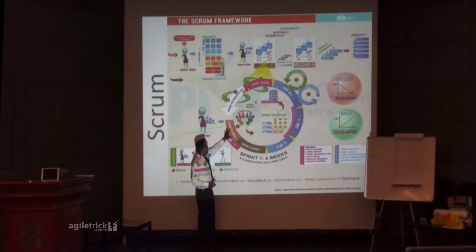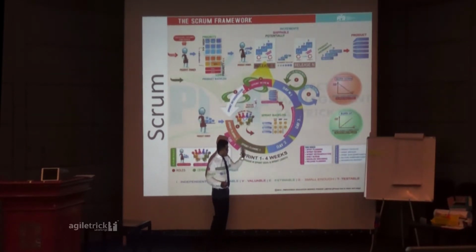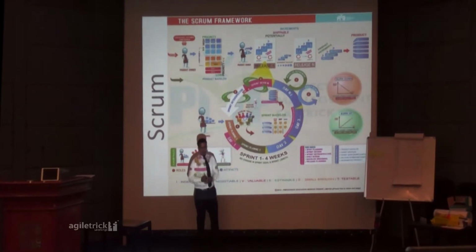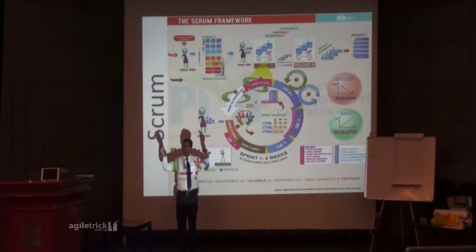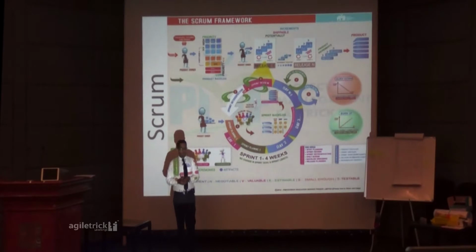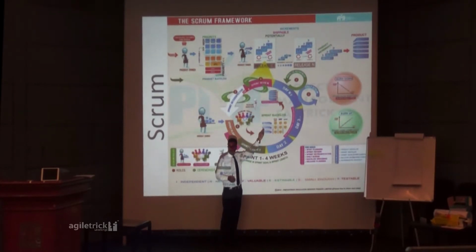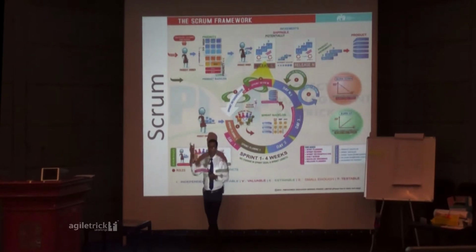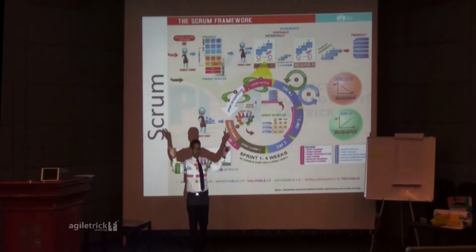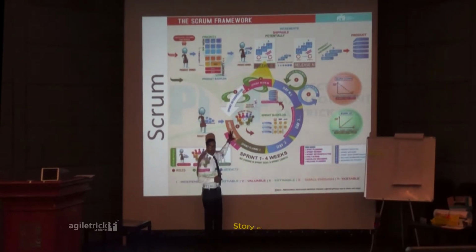Meeting 1 is the first half of day 1, and the second part is the second half of day 1. What they need to do is break the user stories into tasks. For example, to implement story 1, I may have a development task, UI task and performance task, yes or no? They can even do story point estimation here.